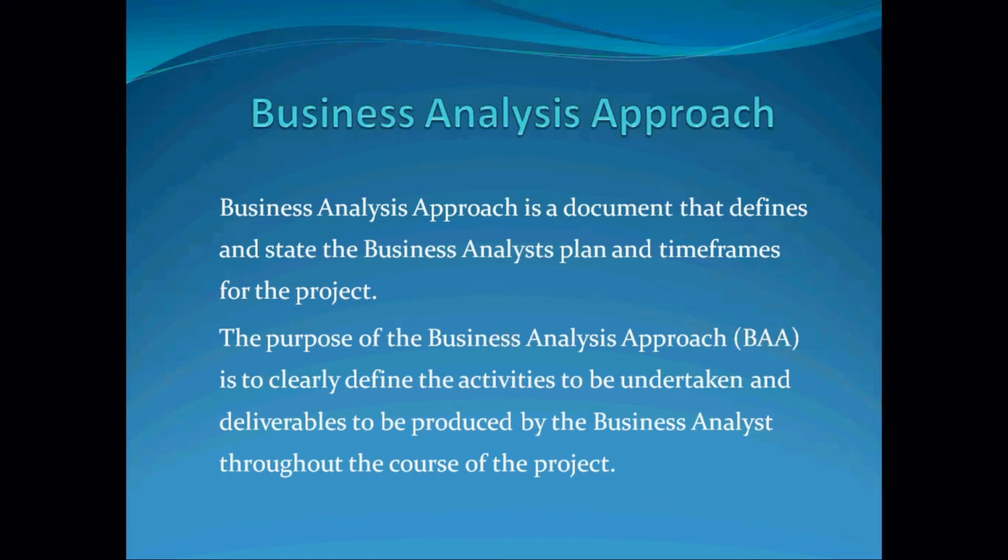But the bottom line is that once you list out all the deliverables or the artifacts that you need to produce on the project, and you also put the estimated time, your BA manager will sign it, and if the project manager is happy with it as well, your project manager will also say, okay, approved. So that means that is an agreement between the project and the BA. So during the course of the project, if anything comes up and the project manager says, oh, I need you to document a procedure guide, I need you to document